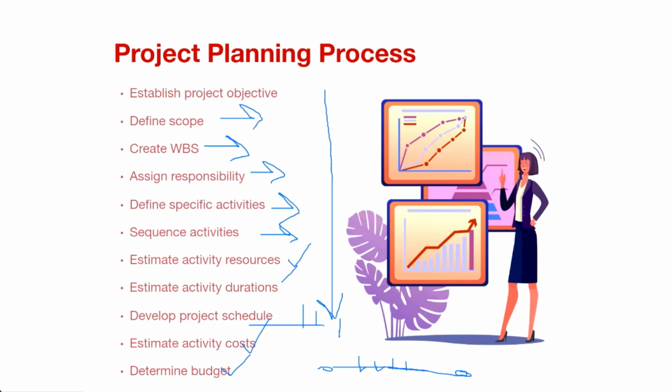So the work breakdown structure gives you the list of activities. The activity consists of three things. An activity consists of a person responsible for completing that activity. It has a time allocated for how long that person is going to take to complete that activity, and it has a resource allocated to it. So does the person need a specific resource in order to complete that activity? The time and the resource then give you an opportunity to calculate the cost of that particular activity.